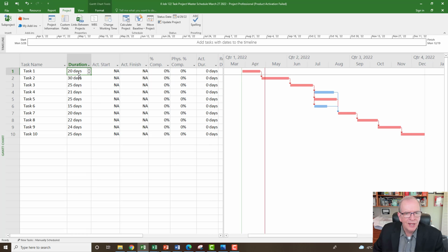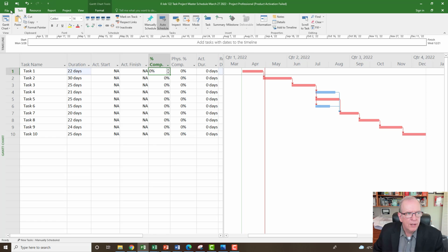And I'm going to say task 1, it was supposed to take 20 days. I'm going to say it took 22 days. Okay, so I'm going to say it took 22 days, and I'm just going to click here, and then I'm going to say it's done. Now the quick way to say it's done, I could put actual start, actual finish dates. I could put in 100% there. That would do the same thing. If I click on this task tab here, there's some nice little tools here. So that would be doing the same thing as typing in 100% or putting the actual start, actual finish. So in that case, I've got that done.